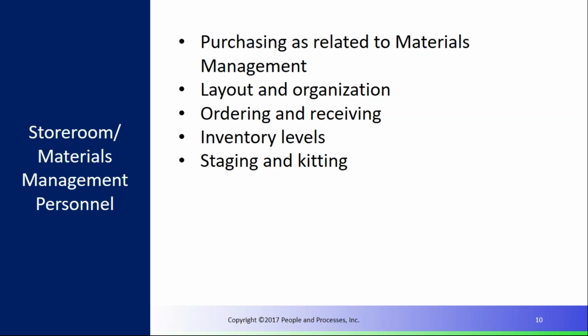And I'll make the comment too, that it's really important that we think about buying things through the stockroom. The reason is that if we don't, then we can't track usage. If we're using P cards as an example, P cards being purchasing cards, if those don't get to the work order, then we really can't track cost.